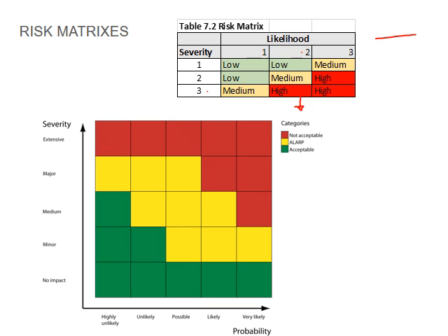It might even be a 3, which will also highlight it as a high, but because it is quite a severe incident, even if the likelihood of it is quite low, you will still sit with a medium-high risk. So that's the thought process that one goes through in identifying the risk priorities on site.